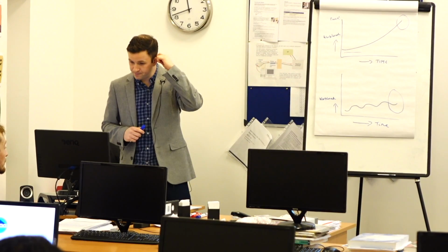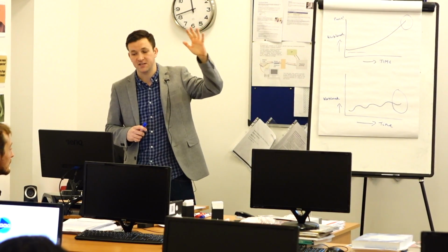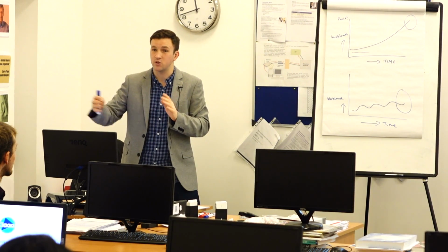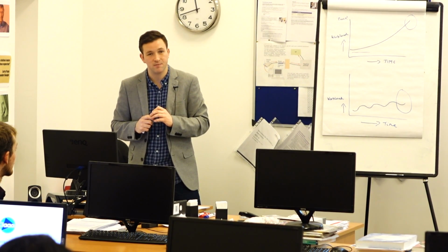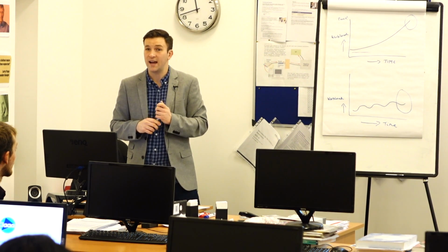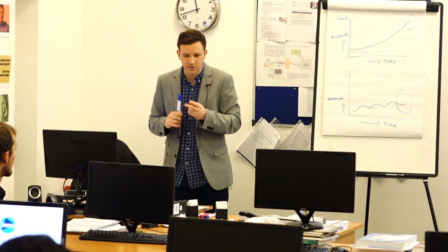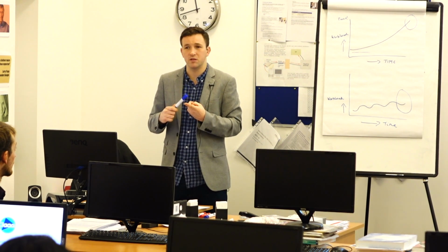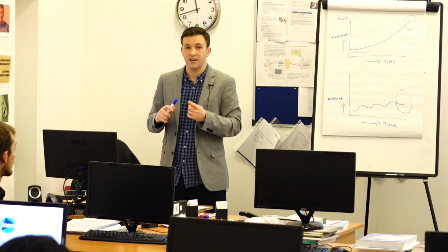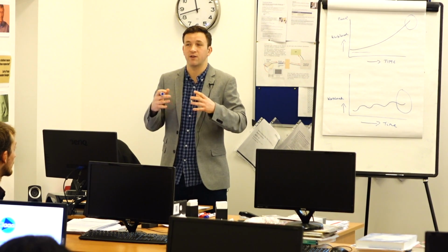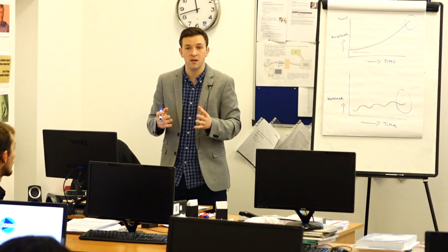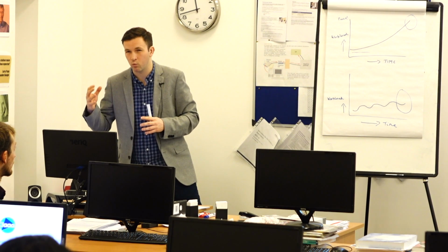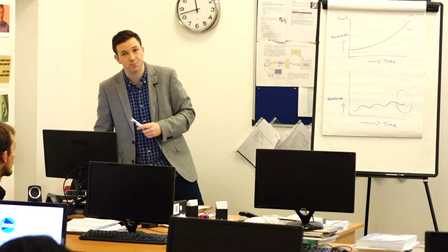So again, each sprint is broken down into what I said. The first day is the plan for that sprint. The second is obviously the development, which is carried out over that kind of 2-week process. Then on the last day of the sprint, we have 2 meetings. One is called a review meeting, and usually this happens with the customer or the client. And what you're looking to do here is that kind of collaboration process where you present the work you've done, you go over what changes need doing, and what items you're likely to do in the next sprint.